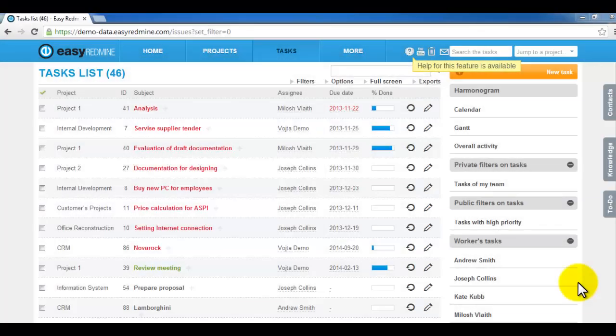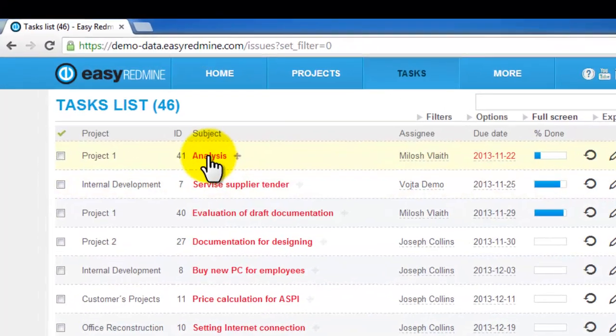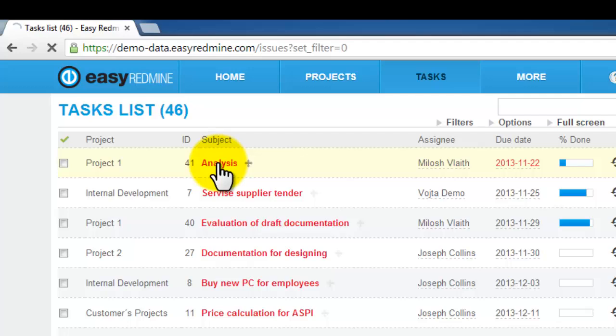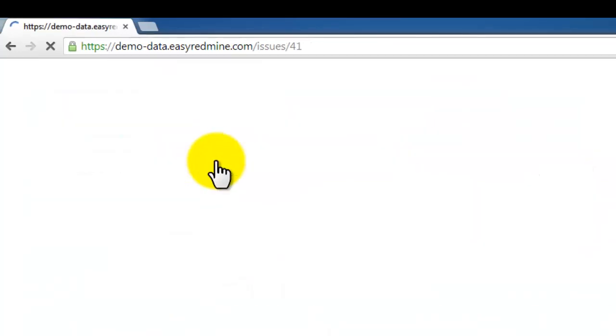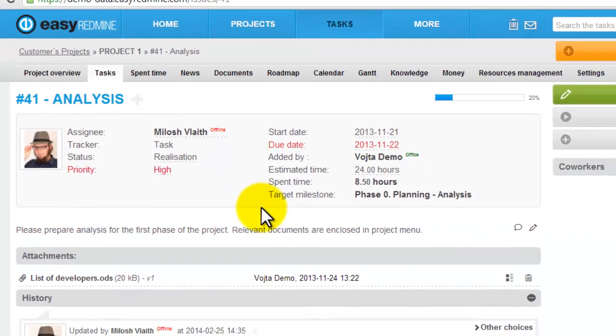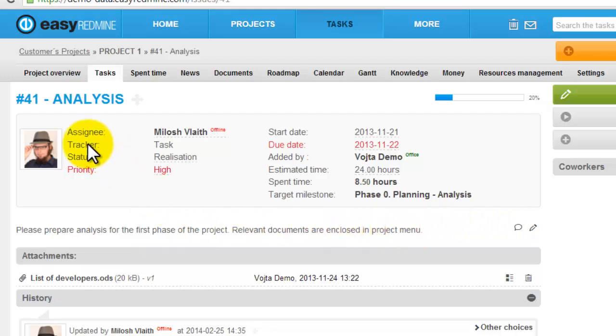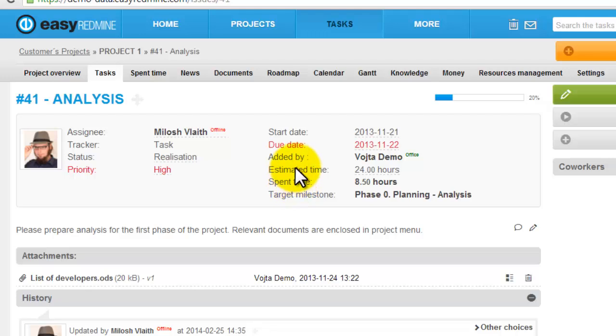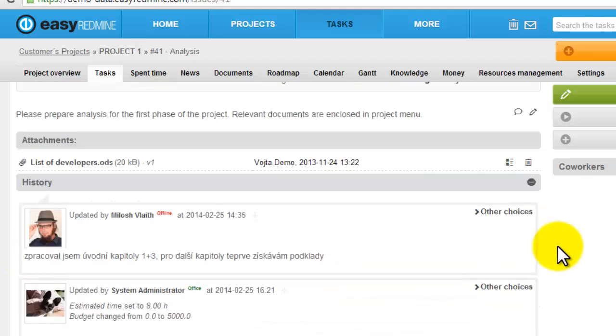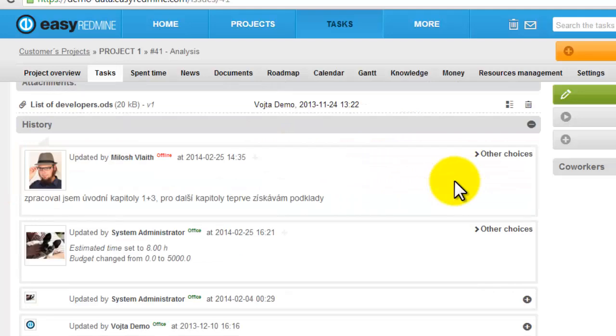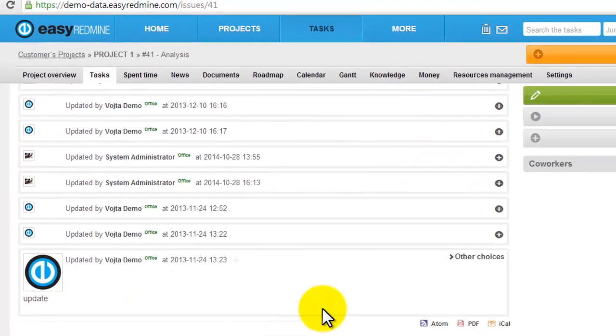To display any task detail, just click on its name. Here you've got basic information like who is it assigned to, what's the priority, what's the spent time and what's the estimated time. Here you have attachments and afterwards the history of how tasks evolved.